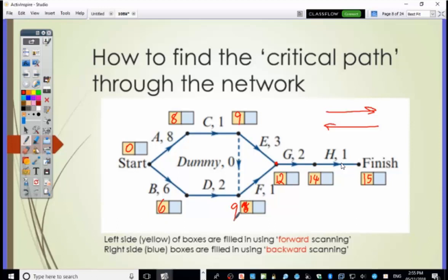I've forgotten there's 2 ways into that. Quite right, thanks for that. But that still makes this one 9 plus 3 is 12, or 9 plus 1 is 10. The answer is still 12. All right, so even dummies have an issue here.